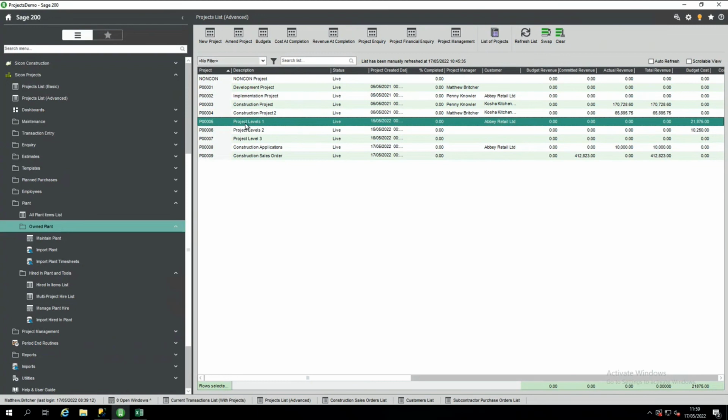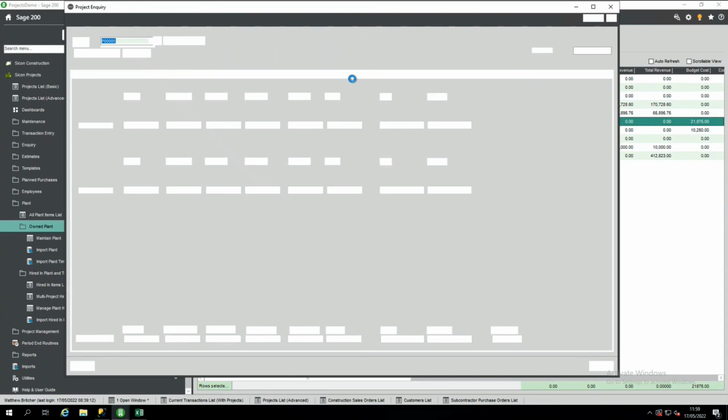So you can distinguish between stuff that you're hiring in and stuff that is your own and you're just using on the project and costing in. And raising a PO that gives you the minimum period of one week's hire, and then rolling those orders on, so you can keep an eye on the outstanding orders that you have for the hire asset. So you're making sure that you're returning stuff as soon as possible, so you're not incurring extra costs on the projects.